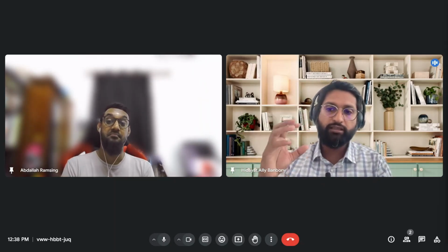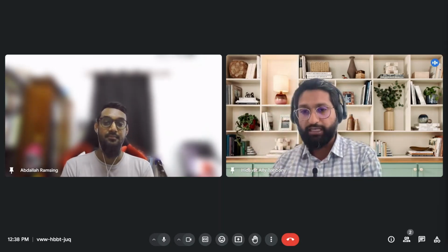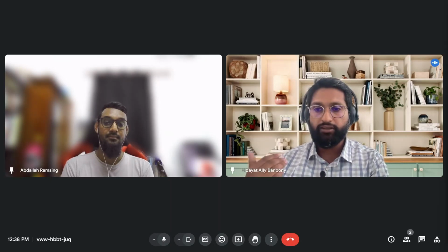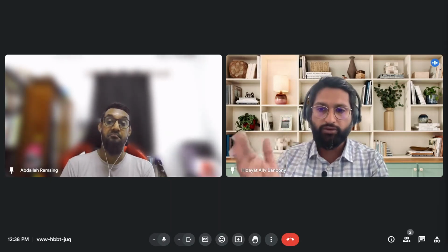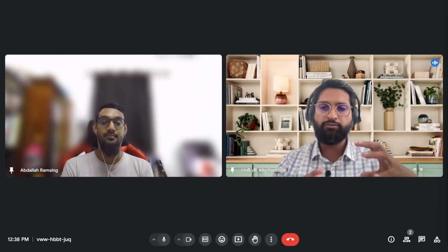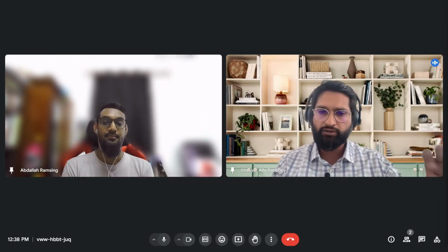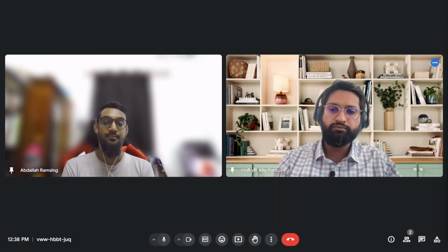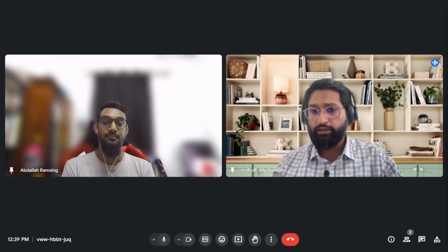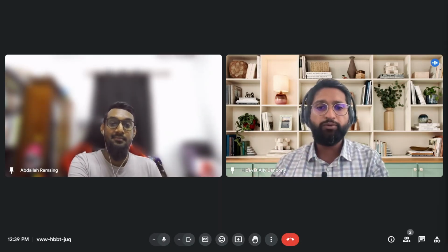So if you can target the top 3 or top 5 items, and they should be actionable before the next retro, taking your time and everything into consideration, then you take that responsibility. Okay, 3 items, what you said to me, we have it. So the framework for me is very simple today: have a pre-retrospective. Each one does it themselves. They don't need a meeting for that. You have 5 minutes, think of what you're going to say, have it open, polite, and respectfully said to someone. Then you go in your retrospective, you note everything, we can discuss it. Take your top 3 you want to talk about.